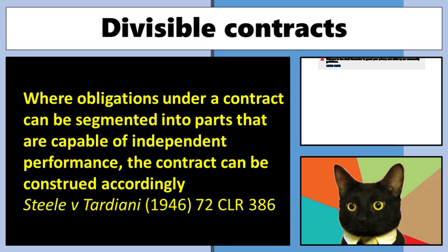And so an example we have is, say you have a house, you want it to be recarpeted, all right, and there are 5 rooms, and each room is approximately the same size and has the same amount of carpet in it, and the amount is for $5,000. All right, somebody comes in, they do the first 3 rooms fine, they do the 4th room, they do a terrible job, and they don't do the 5th room.